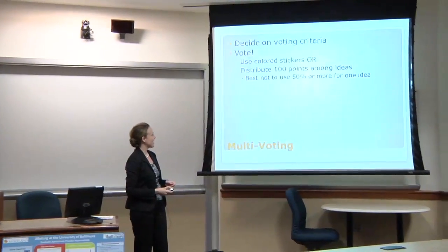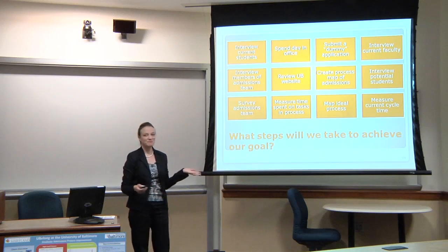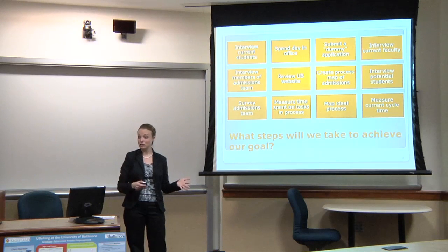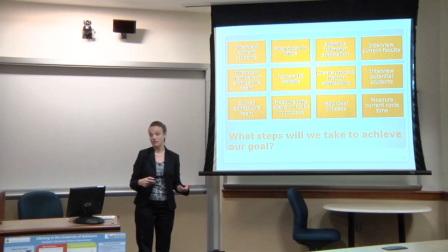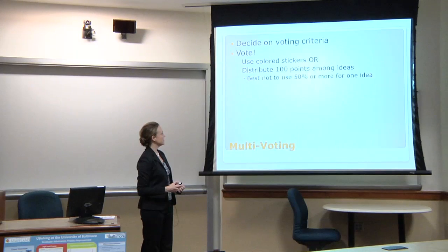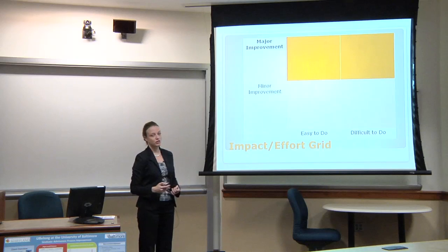Let's go back to these tasks. Reviewing the University of Baltimore website, probably not a huge improvement, probably only a minor improvement, easy to do, but not a major improvement. On here, I think there's almost nothing that would be really easy to do. Some things are easier than others. So this may be a good way, once you come up with this list of tasks, to decide which ones you want to focus on that are going to get you most to your goal.